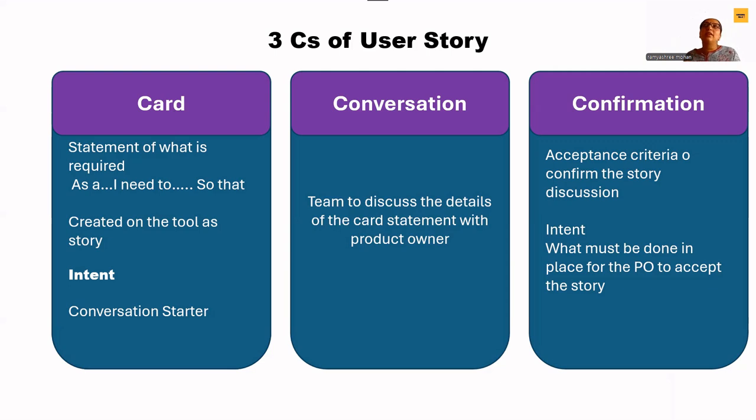Fine, this is fine. But then as part of a user story, there have to be certain requirements. The user story title should be clear. And the user story points should be there. What is the user story point? Like how many days of effort is required for the user story to be completed? And then acceptance criteria. So how will you say whether the user story can be accepted for development? Only when the acceptance criteria is mentioned, right? What is acceptance criteria? What and all has to go? It has to be crystal clear, basically.